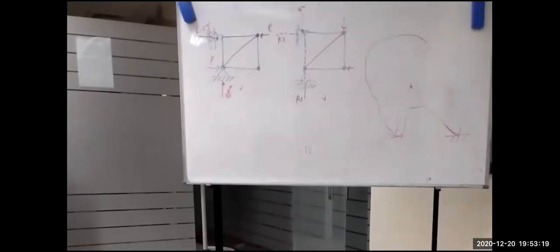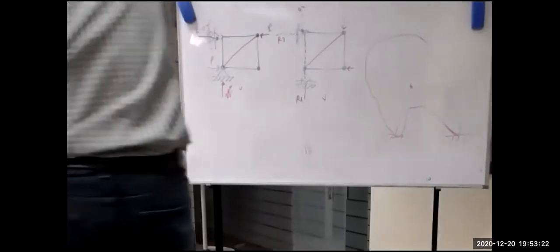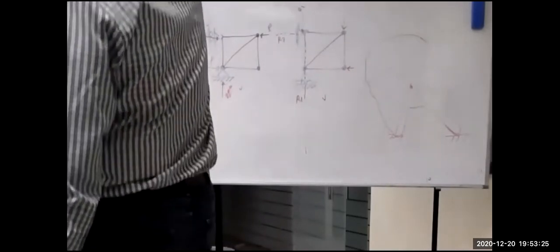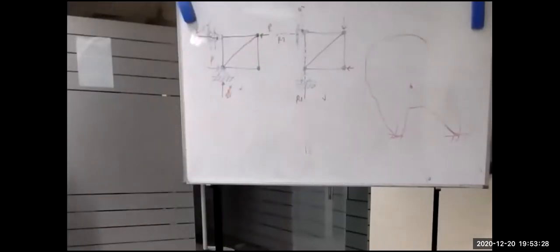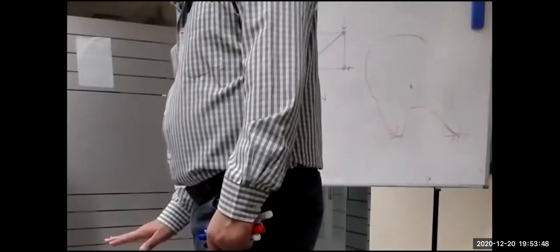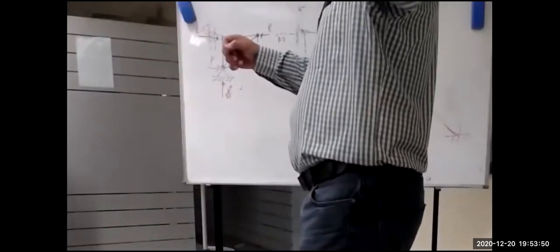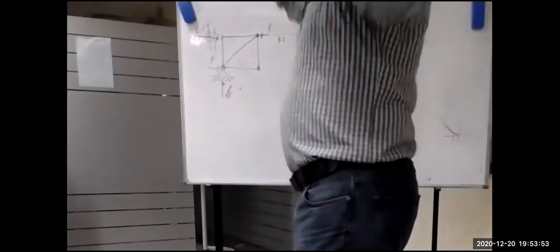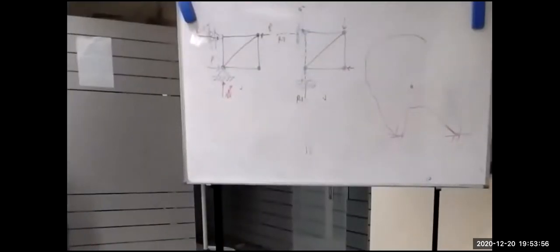Which one of the following is captured in the work breakdown structure? I will capture what? Capture in the work breakdown structure. The project lifecycle, or the scope of the project, or project cost? The scope of the project. We go to the lowest work package to reflect 100% what we are going to do. The scope. See, number 11.